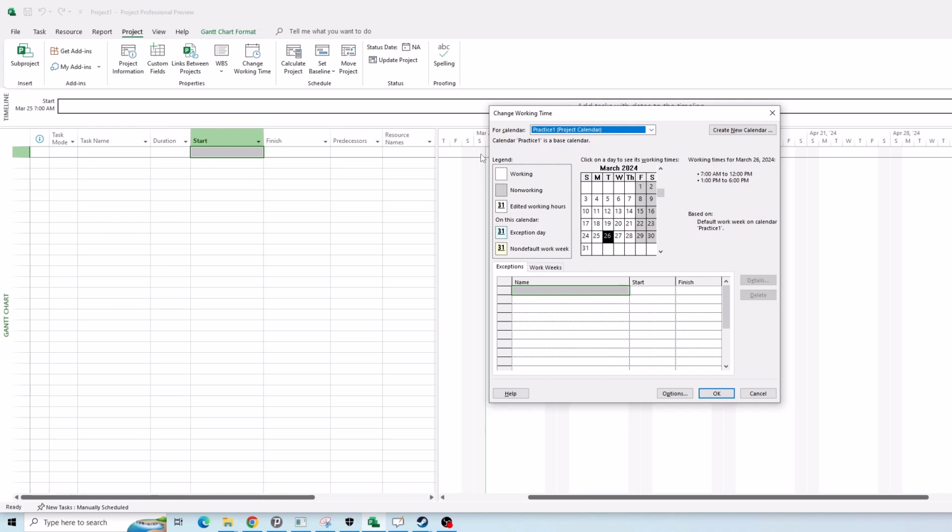And same for resources. Each resource can also have a separate calendar. You may define one calendar and assign it to resources and tasks, but it's up to you. But each resource and each task can have a separate calendar. Okay. We will discuss this when we have a session about tasks and resources. And I think I covered most of the important points about the calendar so far.